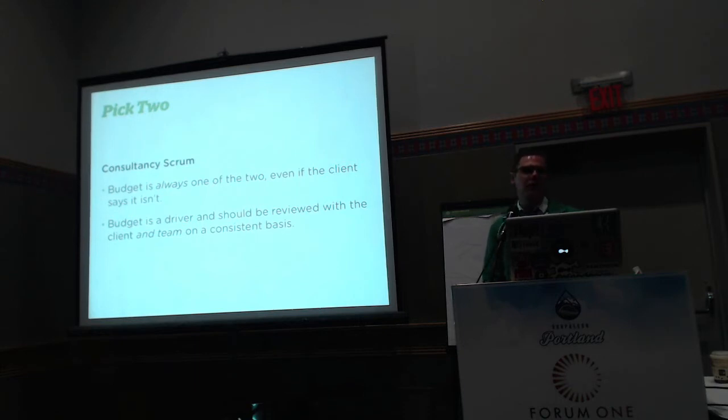Just say, hey, we're about 50% of the way through the budget, but we're about 40% of the way through the functionality. What that will do is apply gentle, positive pressure to the team to say, hey, let's not gold plate so much stuff. If there's a way that we can still deliver the value of that functionality, but not necessarily heavily customize it or make it super, super slick, if we can just deliver functionality quickly, let's focus on doing that for the next couple of sprints, and then we can realign our budget and how much functionality we've been able to deliver.